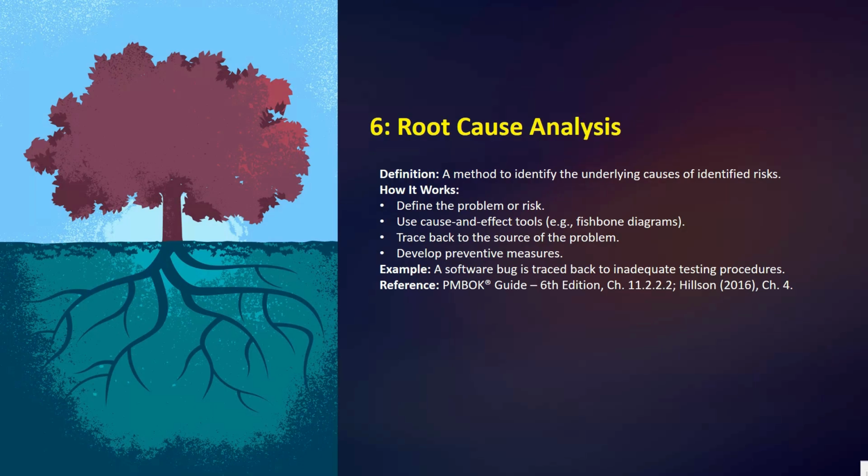So in root cause analysis, once a risk or problem is identified, you use techniques like the five whys, or you can say the cause and effect fishbone diagram, to drill down and trace the issue back to its origin. By addressing the root cause, you can implement preventive measures to stop similar risks from occurring in the future as well. So here we have the example: a software bug is traced back to an inadequate testing procedure.